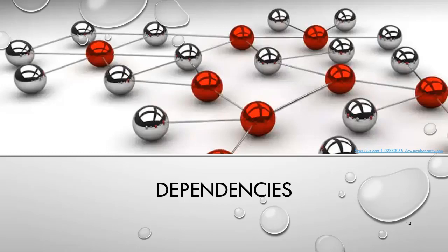So while working through these dashboard projects across the country, we discovered several previously unrealized dependencies. And Jim, I believe, already touched on these yesterday. But this is when the timing of our milestones is directly dependent on the timing of milestones or actions of other agencies or other entities involved in the project. In other words, we cannot complete our milestones on schedule without other entities completing theirs. Understanding dependencies is vital when developing permitting timetables and milestone target dates.